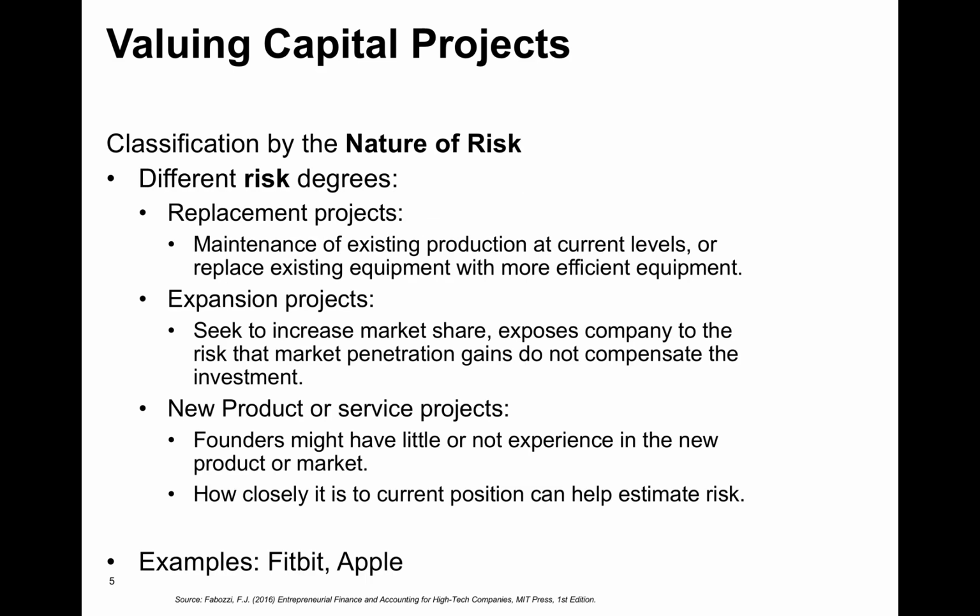So one thing is to look at the economic life cycle of the project. Another thing is to look at the nature of the risk. We would like to argue that when we value capital projects, we should take into account different types of risks. Some projects are what we call replacement projects. Here we are just making a substitution of a project that already existed. We are just replacing it with a similar one. Maybe we are upgrading, adding some new equipment, but it's not approaching a new market or using a new technology or any other of those more complex situations. This becomes quite easy to forecast and build a project. This also means that the risk is easier to assess.